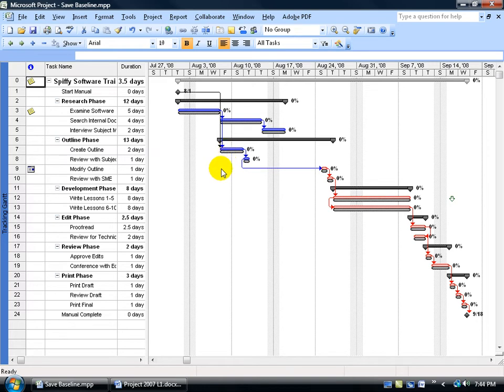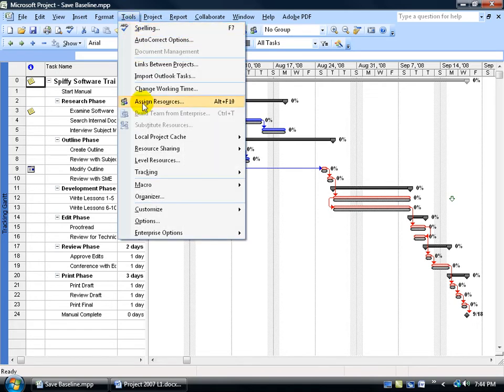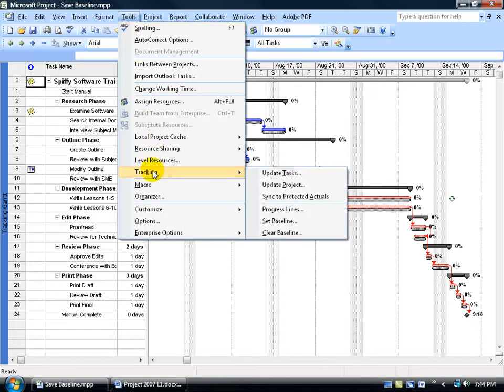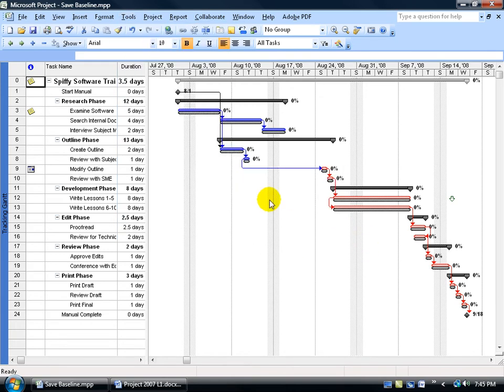Now, for whatever reason, if you need to clear your baseline, in other words you don't want it saved at this time or set at this time before you begin the project, again it's the same place, Tools to Tracking, and then come down and click on Clear Baseline. I'm not going to do that. I'm going to click off in a blank area.